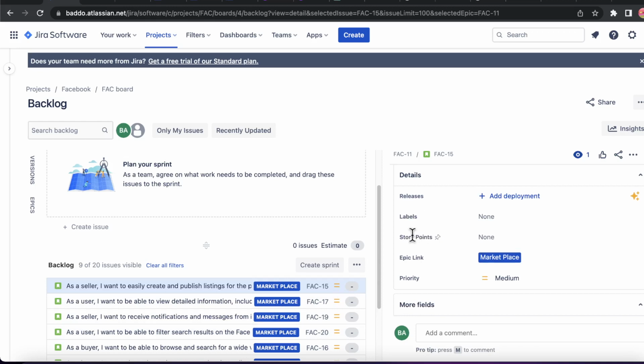And then we come to story point. This is where you are estimating this user story. So every user story will have its own story point, right? So we have what we call planning poker, which is again not going to be handled here. I have videos on that. So planning poker, the team meets, and by planning poker, they go through user stories, vote on them, and select a particular story point.